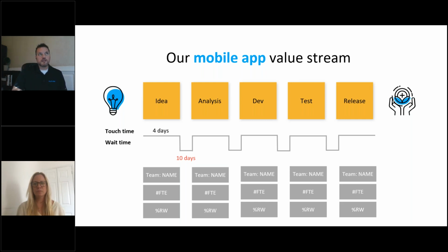I did notice in the experiences I had, people would actually have arguments over how much was the rework and how bad was it. But once they agreed on it, they did agree to ranges. And once we got to ranges, you could start to see where the problems were in the entire flow. Oh, the requirements were bad up here, which led to the wrong things being analyzed, the wrong things being built, and all at the end the wrong things were coming out. So the team was able to point back and say, let's fix it up here where it's more important.